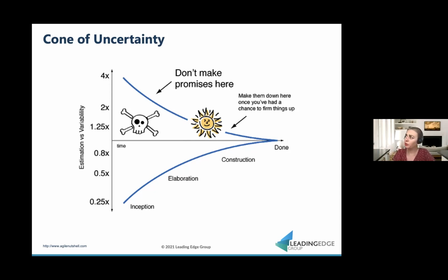Just a quick point on this one. In traditional project management, you will have 3 constraints. So time, budget, and scope are always locked, and the quality floats somewhere there and very often is jeopardized. In Agile, you will have only 2 of those constraints locked. You have time, which will be locked. You have a budget, which will be locked. And I will explain that in a few slides later. And the scope will be flexible.